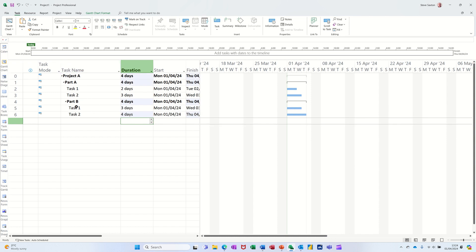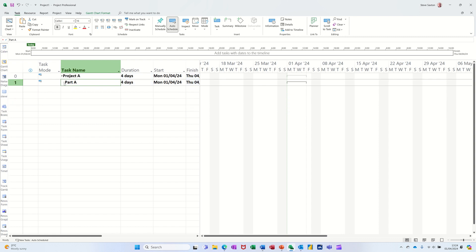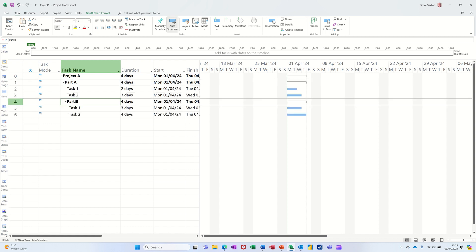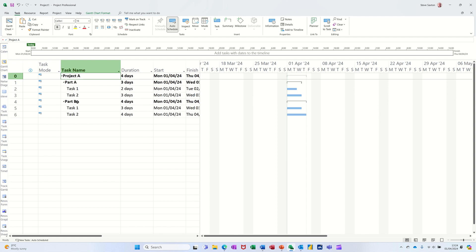Now the way this is sitting, because I didn't outdent when I was doing task two, it's picking that up. And if I collapse this, watch, everything's sitting underneath there where I don't want that to be the case. So I'm going to click on that one and I'm going to outdent that so it's out in the same line as Part A. So if I collapse the project summary task, everything disappears and now I've got all the tasks, the summary tasks that I've created and the subtasks underneath each of those.